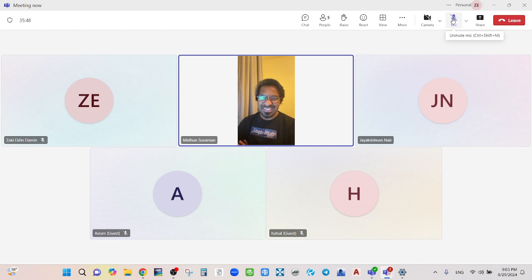And second is that it's a balanced amount. Why? Because in terms of the employer, the amount is sufficient or reasonable for him to find a new contractor. Even if the new contractor's value goes a little bit high, he already has 10% money in hand. So it's sure that it will not go more than 10 percentage. And if there are any legal cases, that will be covered by the 10 percentage. Again, the amount of money you are going to pay the consultant to do tendering and everything, that also will be covered within this 10 percentage.